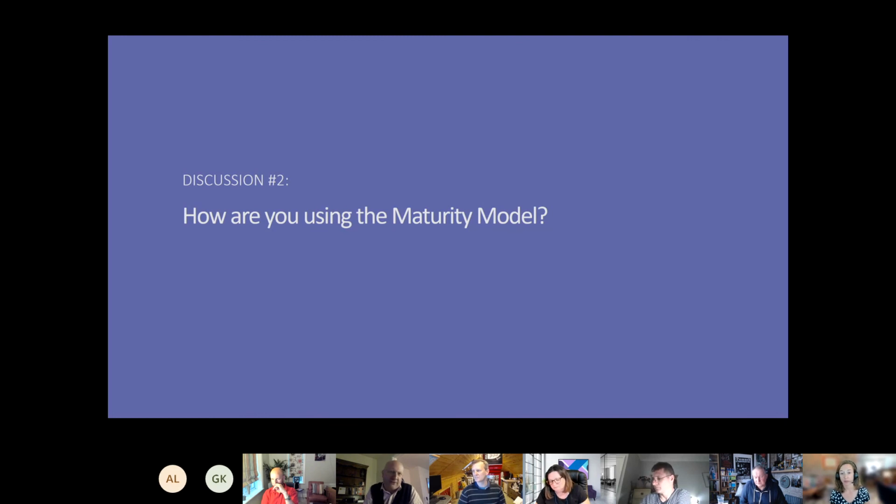But then that's all you have quoted for, and that's all the business are willing to pay for. But as the project progresses, people start thinking, have ideas, come up with other suggestions that haven't been budgeted for, but will extend the cost and the time budget of a project.